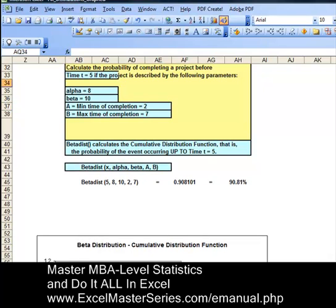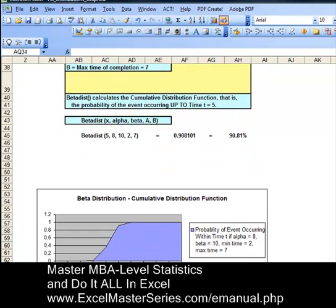X equals 5, alpha equals 8, beta equals 10, A equals 2, B equals 7. And there is a 90.81% chance that the project will be completed by time t equals 5.